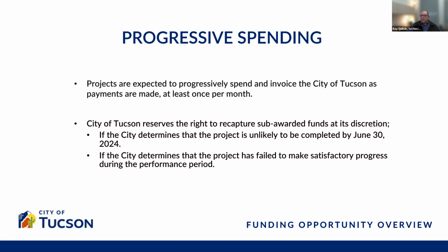Progressive spending. Projects are expected to progressively spend and invoice the City of Tucson as payments are made, at least once a month. Tucson reserves the right to recapture subawarded funds at its discretion. This would happen if the city determines that the project is unlikely to be completed by June 30th of 2024, or if the city determines that the project has failed to make satisfactory progress during the performance period.